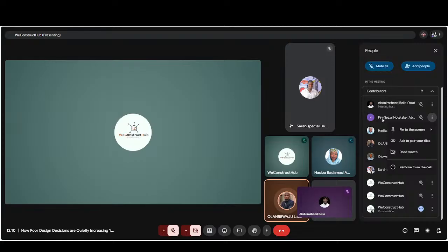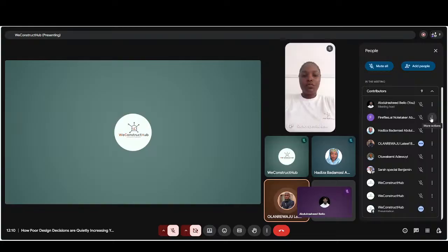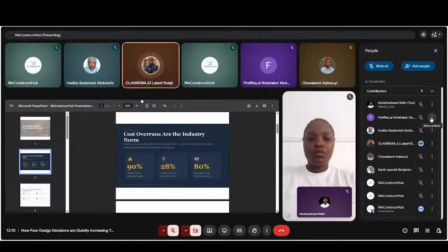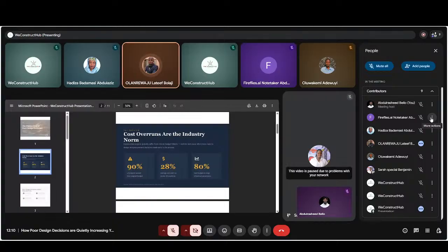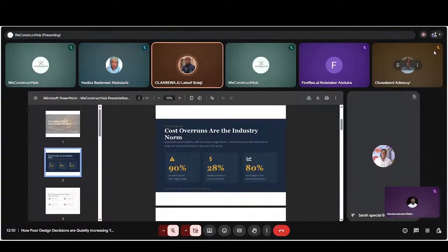diesel price. Diesel price jacked up really high at that time. So we had some of these issues coming up almost at the same time. Prices were not stable. What I'm saying is all those blind spots have to be taken care of. Relying on informal quotes from suppliers instead of verified intelligence is a recipe for a 16% budget overrun. We need to take care of that as well.